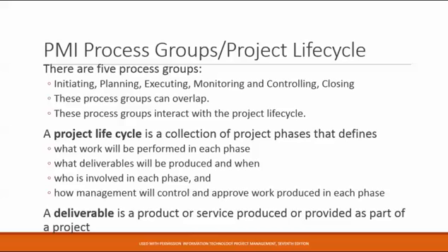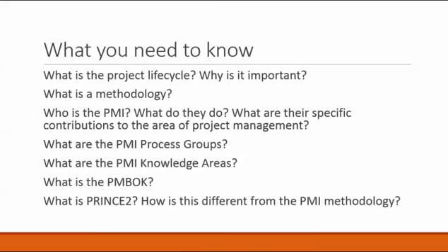And something you want to know is that a deliverable is a product or service produced as part of the project. Deliverables can be multiple types of things that can be delivered at multiple times throughout the project. It doesn't need to be one specific thing that is the deliverable. Your project management documents, like your risk management plan, for example, may end up being a deliverable that at a specific point and phase in the project would be delivered to the project sponsor for review.